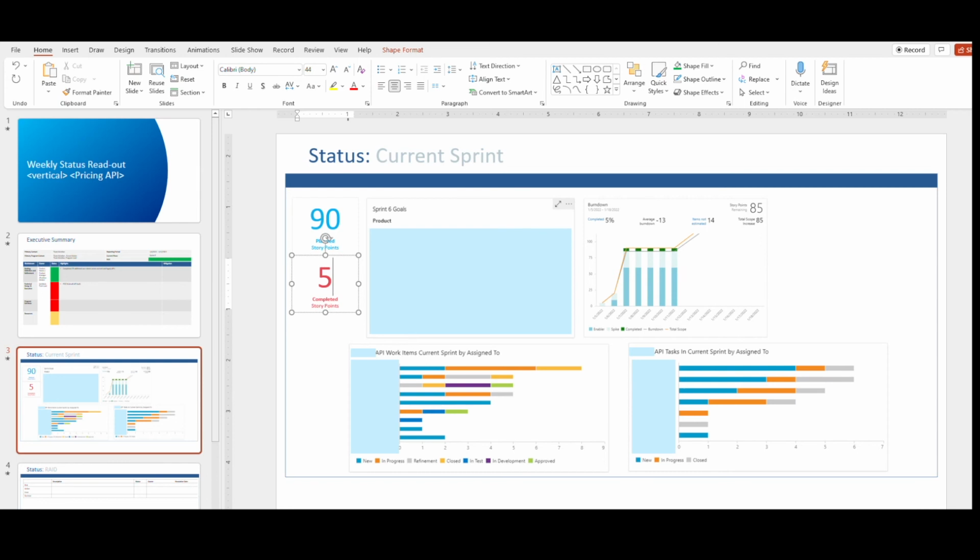If you are not running Scrum-based engagements and you don't have metrics that look like these, no worries. What I'd recommend is replacing it with a burn-up chart. If you're doing a custom burn-up chart in Excel, you could even replace the sprint goals with OKRs or project KPIs, like a pretty standard project KPI is % done. That's very used heavily in waterfall projects. That could all go into the goals section or the weekly update section if you need to.